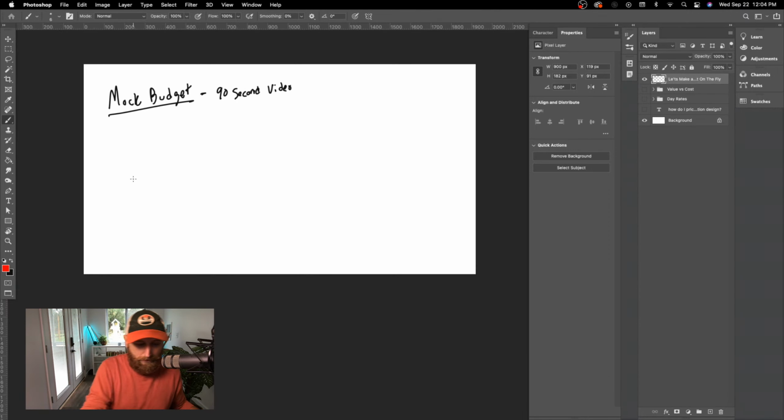Now we need to figure out how long it's going to take to produce this 90-second video. Let's say I need 3 days to do some scripting and initial pre-production organization. I need to look at the brand guide and all the assets that the client has. I'm going to need maybe another 3 days to do some storyboarding. If everything goes well, that's pretty tight, but I think we could get all our storyboarding inside of 3 days.